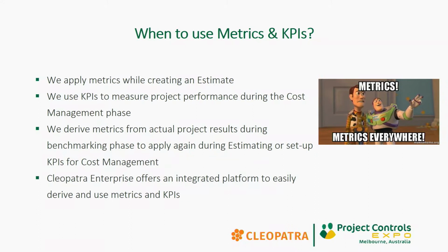So actually, metrics are everywhere throughout the project lifecycle. So we can, for instance, apply them when we create an estimate in terms of factors. But we'll get to that as well in a little bit more detail. We also use it to measure the project performance. So indeed, using a cost performance index or a schedule performance index, productivity, any other way of applying that during your cost management phase.